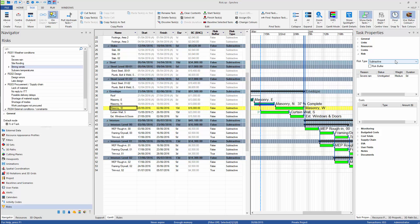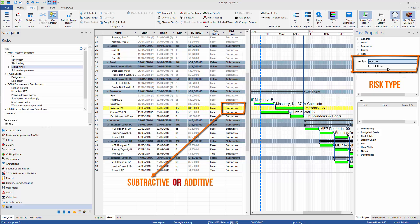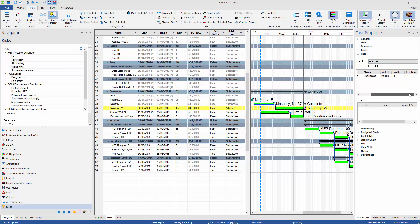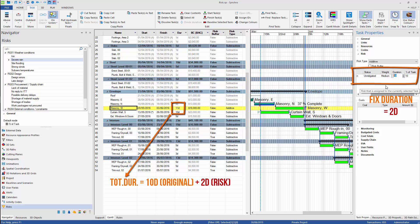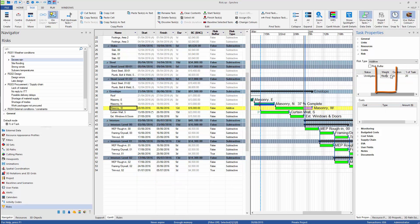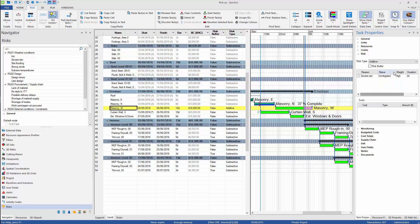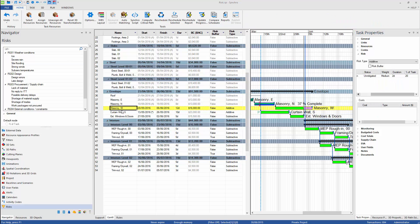Once the risk is assigned to task, we can change the risk type between subtractive or additive. Additive risk will increase the original duration of task. We can also define probability of risk between high, medium, and low. High for most likely, medium 50-50, and low for unlikely.